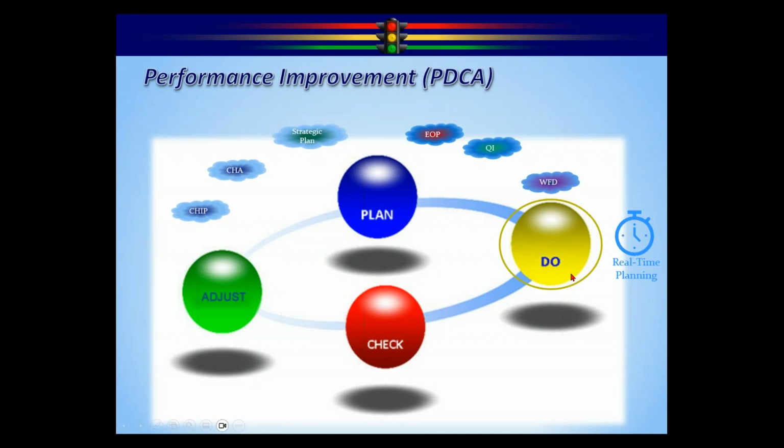Each of those folks who is designated as the activity lead is going to get an email notification. Let's say it's monthly, and they're going to go back in. So Diane's going to go back in and say, hey, I'm done with the training content. And then maybe Fred is going to go back in and say, hey, I've done 9 training sessions this month. And then John is going to go back in and say, I contacted all 20 tobacco vendors. The reason that is critical is because you cannot do the check phase unless you have the information to check against. So either you go out and manually do that, collect the information, or you let the system do the work for you. I'd suggest letting the system do the work.